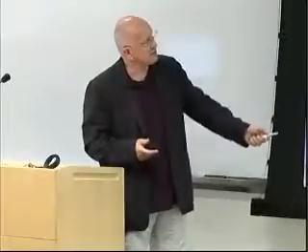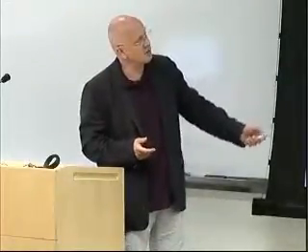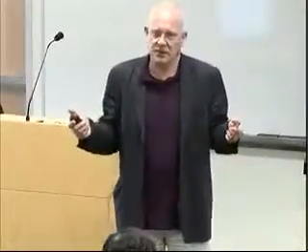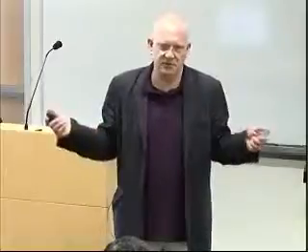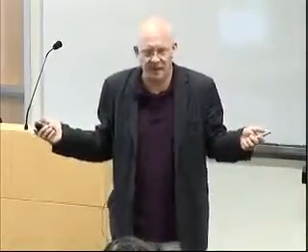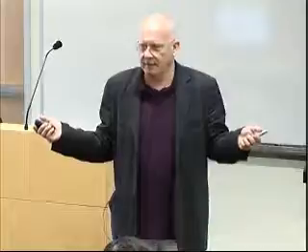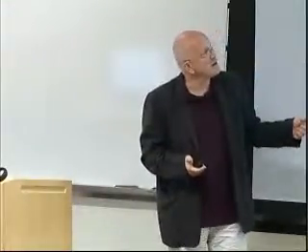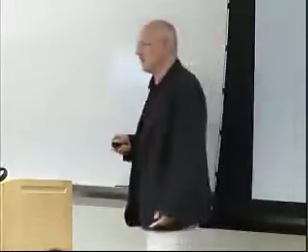So the stakeholder, the user, has a very important role in this iterative process. It might be that among the 5 we are offering, none of them is satisfactory. And I experienced this with a company. I proudly offered 5 optimized solutions. They said none of them is feasible or acceptable. And I said, why? It was the best algorithm in the world. Yeah, but it solved the wrong problem because we forgot to introduce certain constraints and certain considerations. And then we remodeled and determined these qualified plans, and this was then something they could live with.